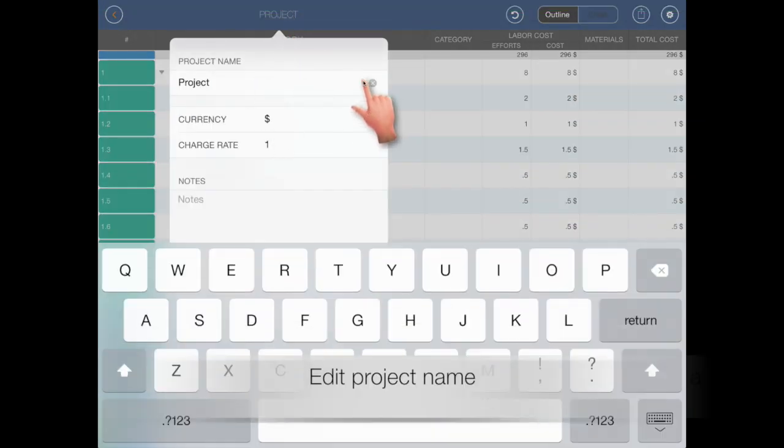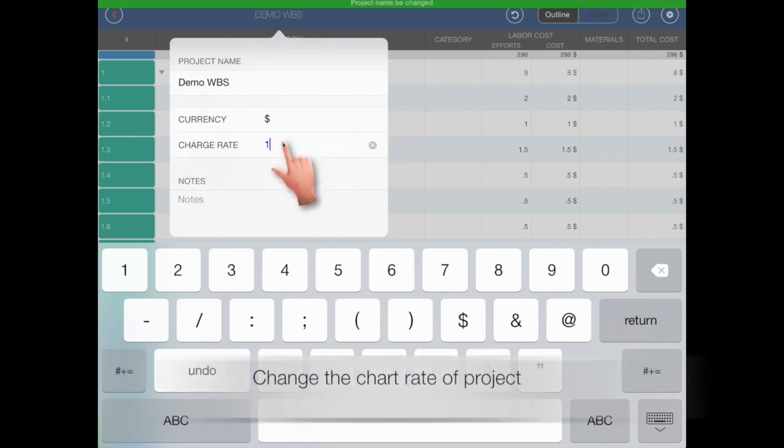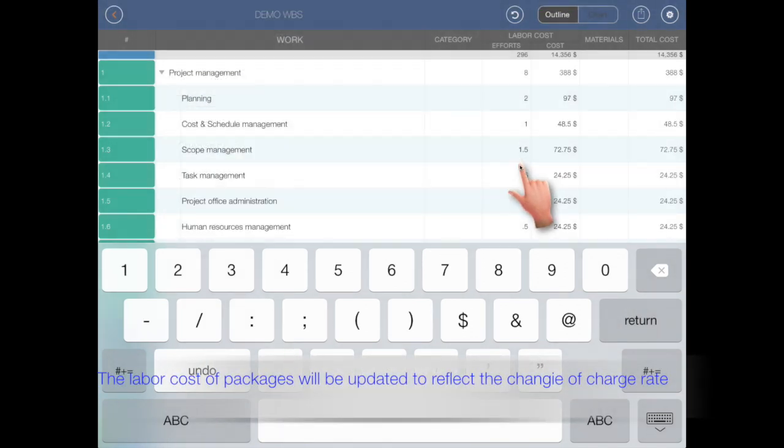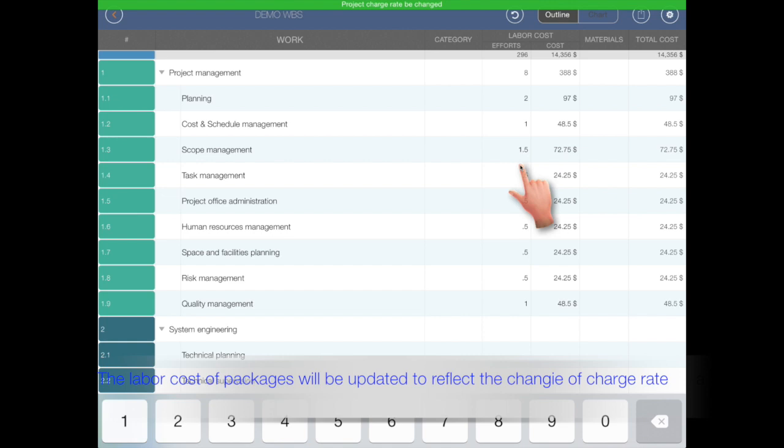Edit project name. Change the charge rate. The labor cost of the work packages will be updated to reflect the charge rate.